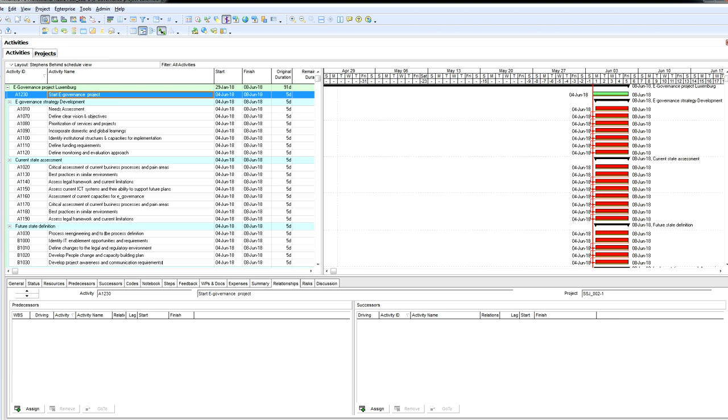Okay, so we created that. What we will do is link that activity right there, which you can link off of the Gantt chart itself. All you do is hover over the end of it, and you want a finish-to-start relationship. You drag the relationship arrow right to the front of the successor activity. You double click it, and it's created a finish-to-start relationship there.